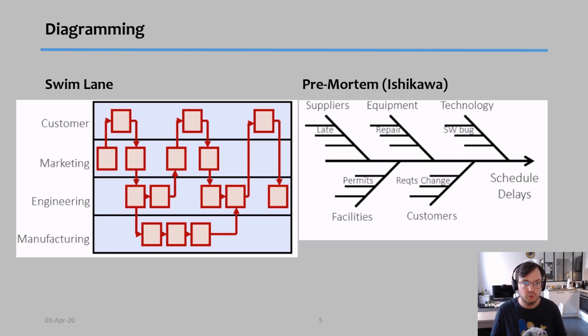What you try to do is make each line a different department on the project, or a different person, for example. Then you explain your project a little bit like a network diagram, through transitions from department to department. For example, this project starts in marketing, and then information has to go to the customer care unit. From customer care it comes back to marketing and so on.